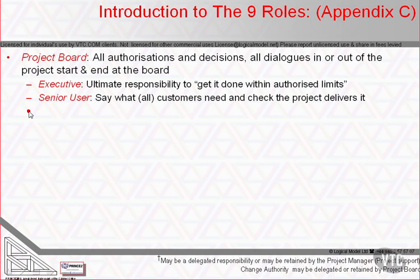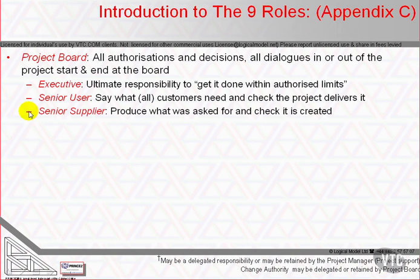The senior supplier represents the interests of those designing, developing, facilitating, procuring and implementing the project's products. The role is accountable for the quality of products delivered by suppliers and is responsible for the technical integrity of the project's products. If necessary, more than one person may be required to represent the suppliers. Depending on the particular customer-supplier environment — for example, under a contract rather than an internal department — the customer may also wish to appoint an independent person or group to carry out assurance on the supplier's products, for example to verify liability for staged payments.